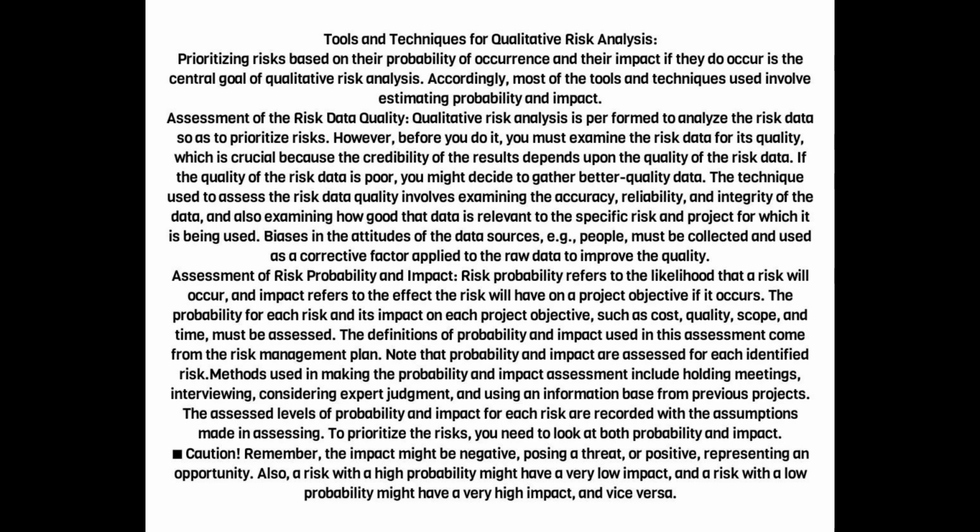The technique used to assess the risk data quality involves examining the accuracy, reliability, and integrity of the data, and also examining how relevant that data is to the specific risk and project for which it is being used. Biases in the attitudes of the data sources, for example, people, must be collected and used as a corrective factor applied to the raw data to improve the quality.